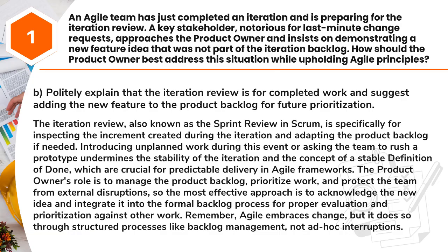The product owner's role is to manage the product backlog, prioritize work, and protect the team from external disruptions, so the most effective approach is to acknowledge the new idea and integrate it into the formal backlog process for proper evaluation and prioritization against other work. Remember, Agile embraces change, but it does so through structured processes like backlog management, not ad hoc interruptions.